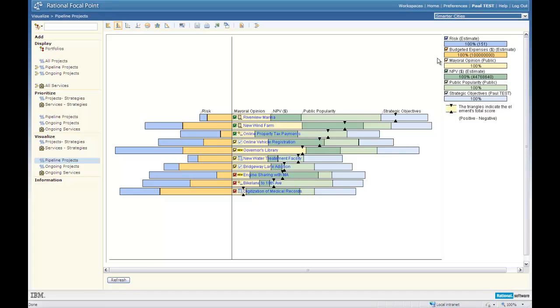Now, let's assume that we don't have that much money. What we'll be able to do then is start deselecting or descoping projects, and you'll obviously see the numbers fall as we do that. So since they're sorted already in terms of value, I know exactly where to start deselecting projects from the bottom. So let's have an example where I just deselect those last three. You can see already that I've slashed my budget, and now I only have 66% of that.